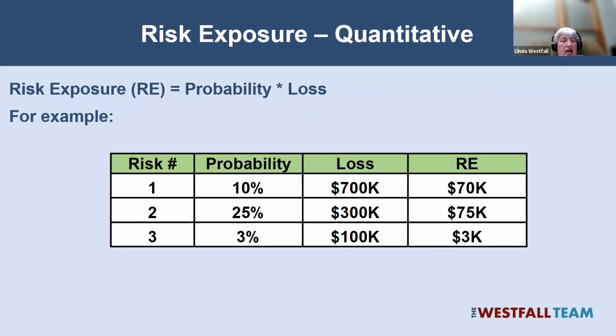If we have a quantitative probability and loss, then we can just multiply. Folks, this is how you bet in a casino, right? The probability of winning times the amount you win is the expected value for that bet. So if you've got a 1 in 6 chance, betting $1 should pay back $6 to break even. And that's what we're trying to do.